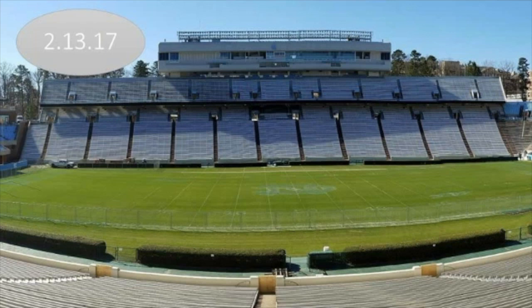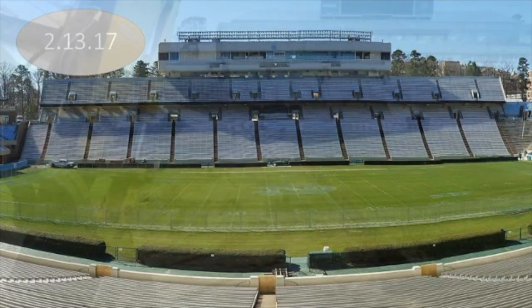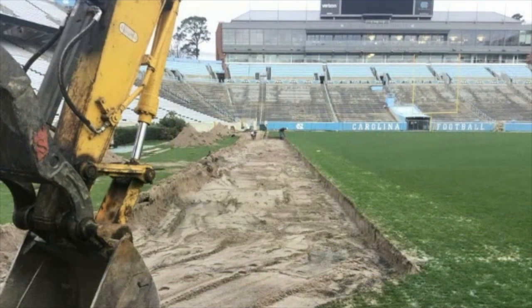It's to the left. You can't really, no, it's to the right, isn't it? Yeah. You can't really see it either way, but we had to establish that perimeter. So this is starting first day. Then we started profiling out the sides where the concrete curb was going to go for the synthetic turf and natural turf interface. Another thing that we had to do here, the original collector line is over there by the hedges from the field we built 2 years earlier.